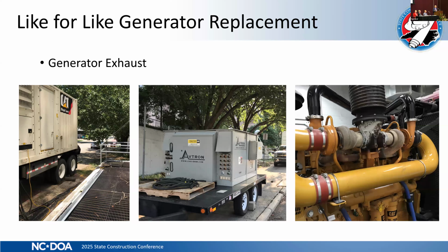When that exhaust came up above that metal grate, there were trees around. There was some landscaping in those trees. The leaves on the trees went from green to brown to crispy. We halted the test. We also melted the cables that were running through the same areaway. That's a story for another day. So we had missed the exhaust temperature.